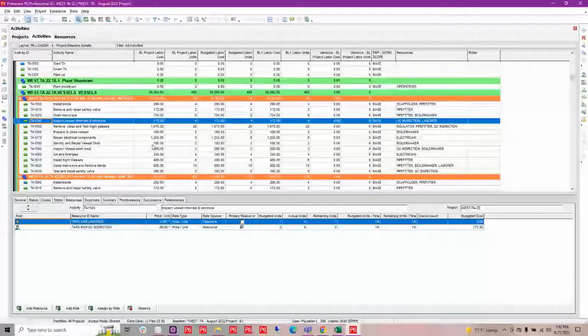I don't need to change any costs per se out there, but I do need to redistribute them. So what I can do is extract my baseline information without detaching it from my project, and I can add it. I can move those costs around, and I can add in my found work.